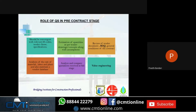The role of QS in the pre-contract stage: first, he should be conversant with relevant ICE codes, tender clause, and specification. Then quantities are estimated as per the drawings, along with assumptions, and a brief budget is prepared. Then there is review of tender documents, a BOQ is made, and general conditions of the contract are noted. Then analysis of the rate of materials, labor, and plant, and maintaining a vendor database. Then analyze and compare quotations received at bid stage — quotations being the figure a contractor gets from a supplier for the price of materials. The QS also plays a role of value engineering, which is a systematic and organized approach to providing a necessary function in a project at the lowest cost.